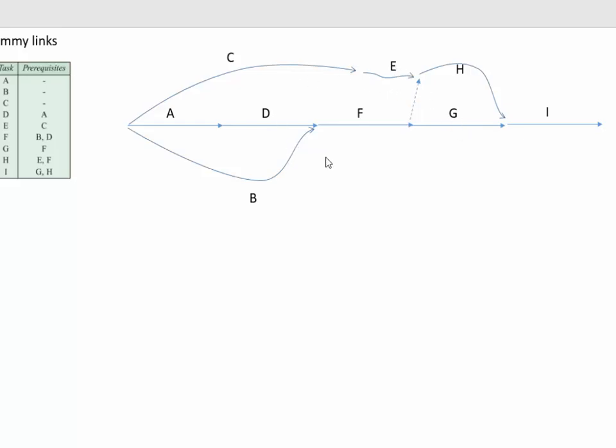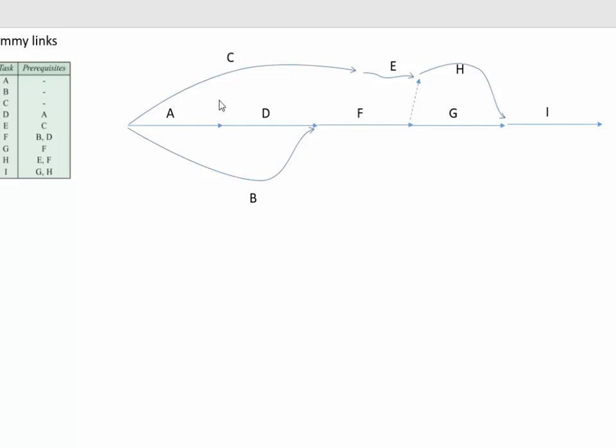You already know that a precedence network like this often has times associated with it. And in the case of a dummy link, it has a time of zero, so you don't actually count it towards anything. But if the critical path was A, D, F, H, I, that could be the critical path. You'd add together A, D, F, H, and I, and that would just be a zero in there as well.